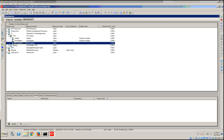You can use the roles tab to define a standard set of roles for all projects in the enterprise. There are no limits to the number of roles you can establish, and they can be organized into hierarchies. The role ID must be unique for each role.